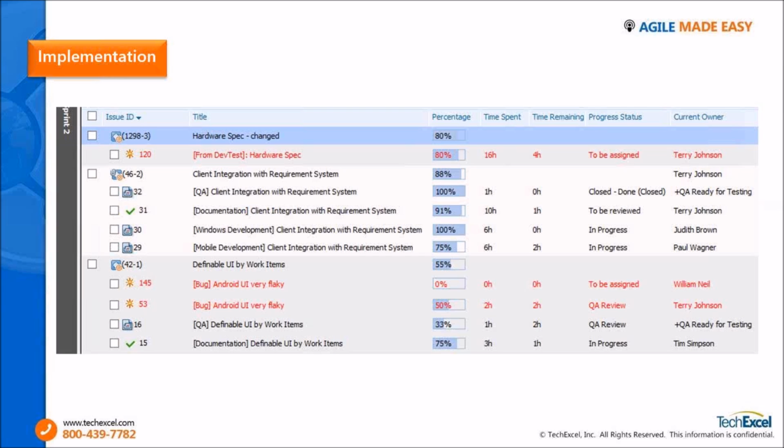So just using this view, we can generate different reports from the system. Let's say we can generate a separate story list report with the percentage and distribute it to our customers, so that they have an understanding of what they can expect out of the sprint or the release and how much of it is complete. We can also generate another report for the engineering managers, for the internal team, so that they can track the progress, see how much of the tasks are complete, where we are lacking, and if we are going to make it on time for this particular sprint.